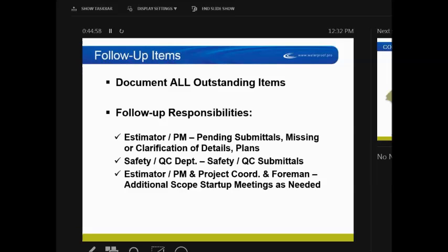In your operations meeting each week, make sure that the guys are bringing pre-cons to your table. What new job startups do we need to do for next week? What new job startups do we need to do for the next 2 weeks? So bring that up in all of your operations meetings for the foreman when you come to the table, and that's going to help everybody plan a little bit better. The fire drills, it is what it is.